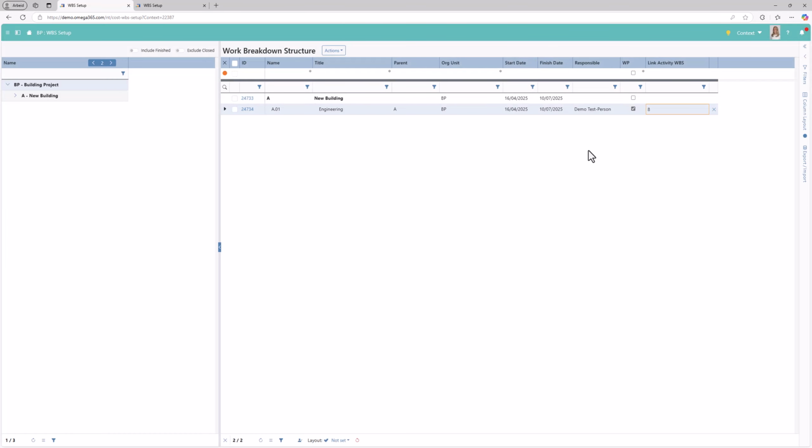New WBS elements can be added even after the project has started. However, once a WBS element is in use, for example, for populating estimates and time phasing costs, it should not be deleted. Instead, set it to canceled.